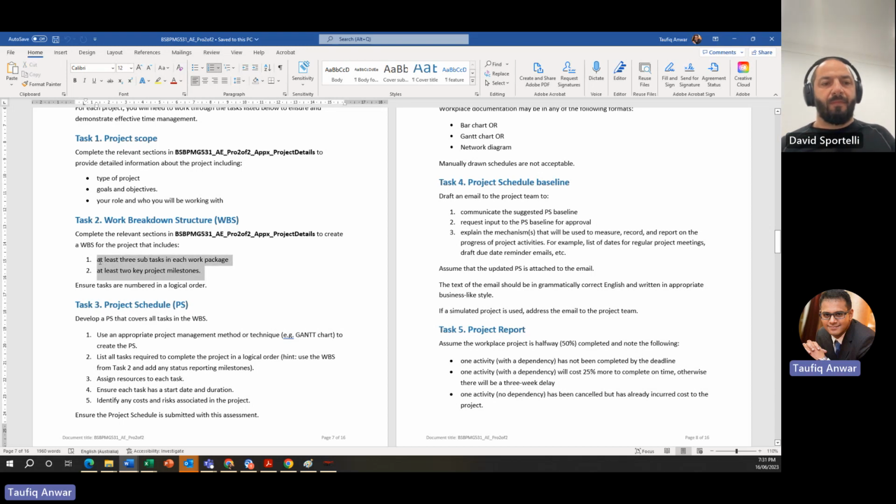Make sure that when you look at the project, you see it in its entirety, with all the tasks that need to be there. It doesn't matter whether it has 1 layer or 2 layers. What matters is that you can say, for example, project initiation phase, underneath which you put a couple of tasks, then the planning phase, project execution, and lastly project closure. That's the idea of the different stages, and you can put the tasks inside them. So you can actually simplify it.